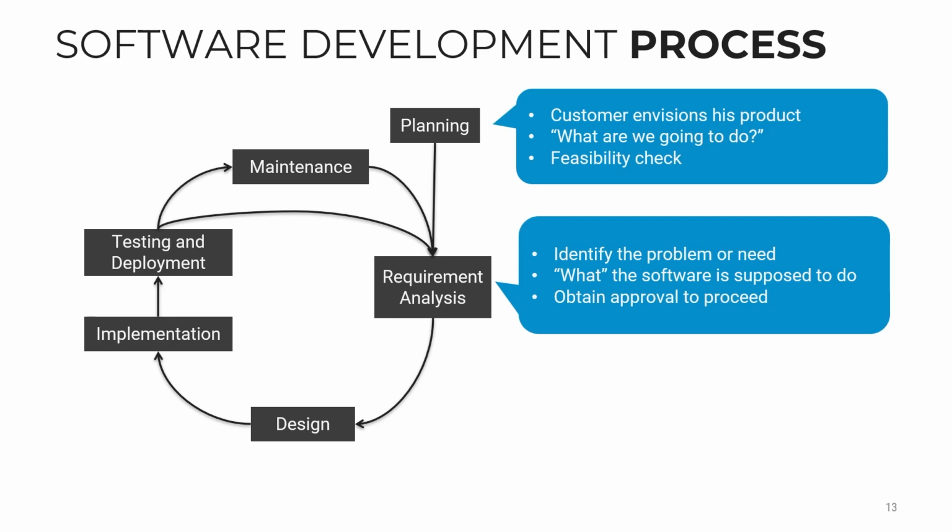And then with this detail, you can start thinking about the budget more precisely. If at the end of this phase you realize that it is not worth it, that we couldn't make it anyway, then stop here. Then maybe you just have to pay the analyst maybe 10-20% of the entire development costs. That's a loss, but not entirely catastrophic.